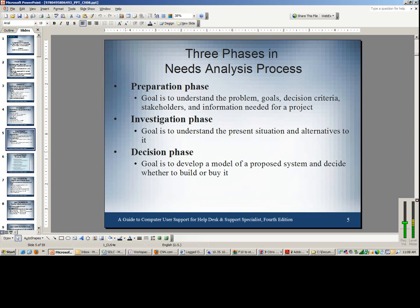The investigation phase is where you determine the actual problem in terms of the specific steps present in the current process and where the problem really lies. In doing so, you identify the different alternative solutions you can come up with — such as computerizing current financial application systems, adding extra modules to a current application, or adding extra hardware for backup and storage. By the end of this phase, you should have a firm grip on the most optimal solution and the most satisfying alternative from among all the options.